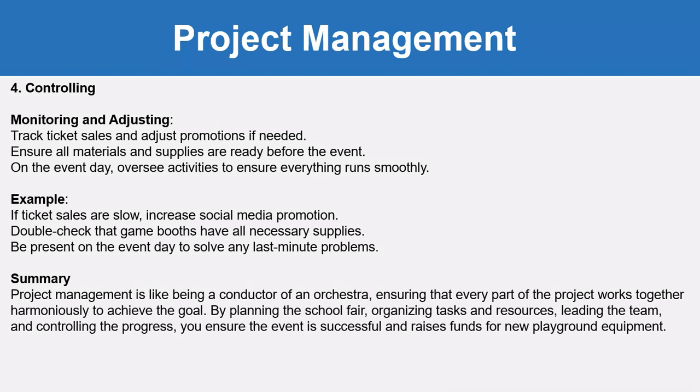Then the last, controlling, means monitoring and adjusting: track the ticket sales and adjust promotions if needed, and ensure all materials and supplies are ready before the event. On the event day, oversee activities to ensure everything runs smoothly. For example, if ticket sales are very slow, increase social media promotion through Facebook, YouTube, etc. Double-check that game booths have all necessary supplies, and be present on the event day to solve any last-minute problems.